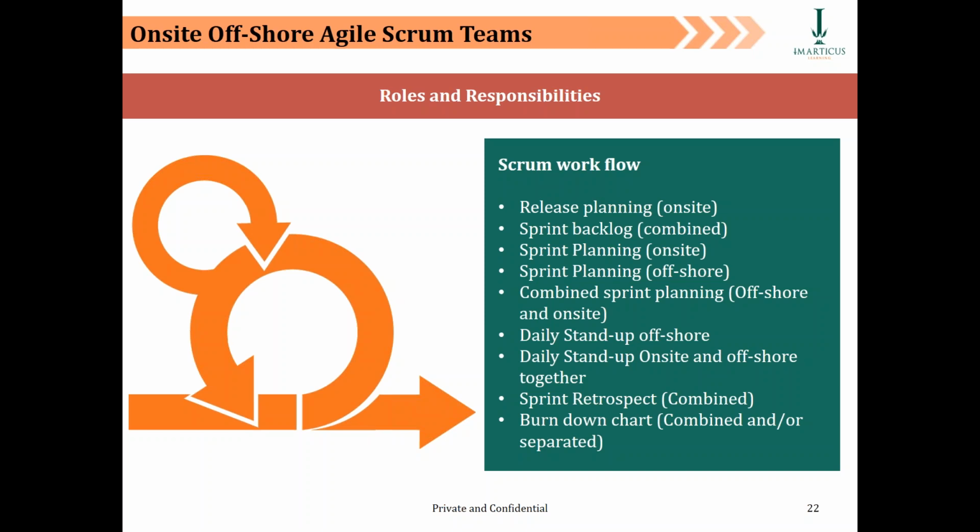So let's divide the work. Let's see what is the best way to do some things onshore, some things offshore, and some things combined. Right now, I am not having three locations. I'm just dividing it between onshore and offshore. Typically China or UK can be the onshore and India can be the offshore. Mostly build and test happens in India, since India is obviously a low cost center, so we do the majority of actual programming, testing and all that from India. So let's keep two things: onshore, London; offshore, India. Release planning must be done on site.